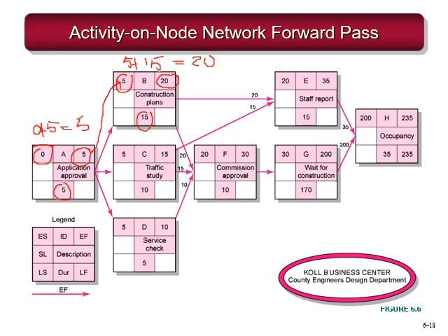For the activity E, which is a merged activity where two different activities merge, activity B and C merge in activity E. Now activity B ends on the 20th day and activity C ends on the 15th day. When can we start activity E? We can start activity E on the 20th day, not on the 15th day, because on the 15th day the activity B is not yet completed.